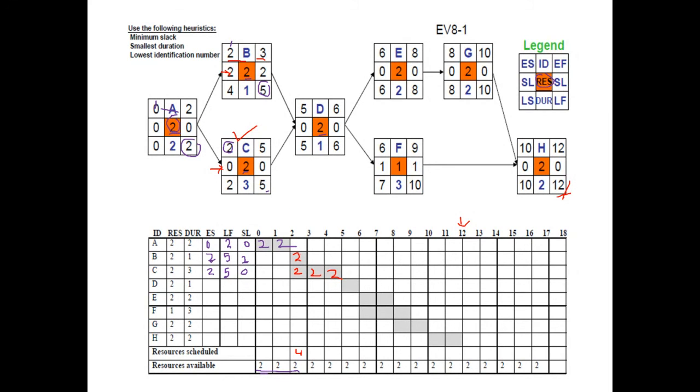So this is now very clear that we can't begin activity B. Now that's very clear that D cannot begin unless B has finished. So B has to take place after C has finished. This means that the early start time for activity D, which was previously 5, has now been moved to 6, and obviously that would go to 7.